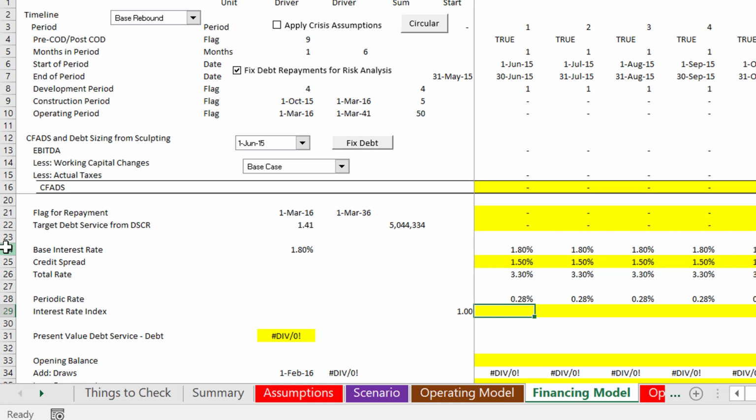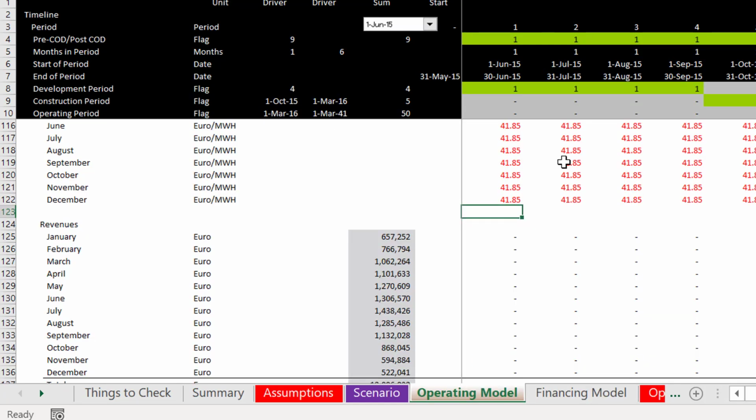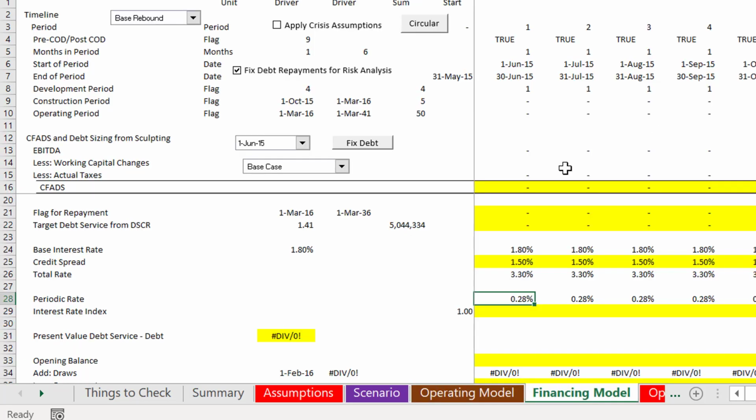Where am I? The periodic rate, we just take that annual rate, divide it by 12, multiply it by our key little thing here, months per period. Keeping all of these key things in sight and nothing else is such a big deal. Learning what to keep in sight.